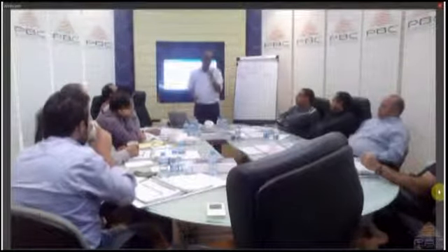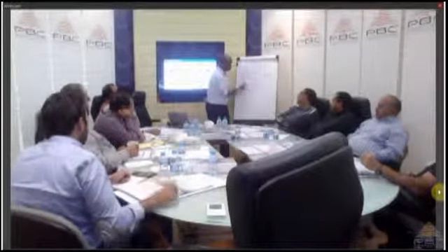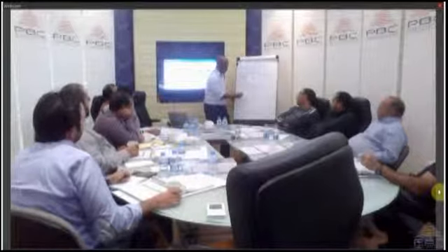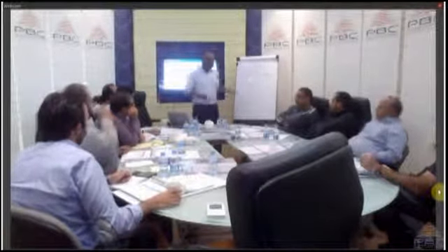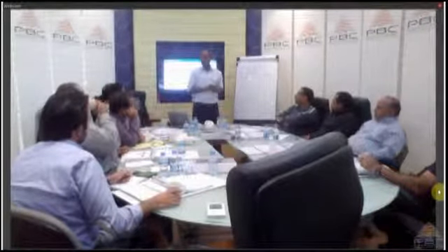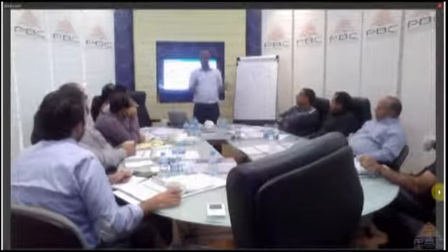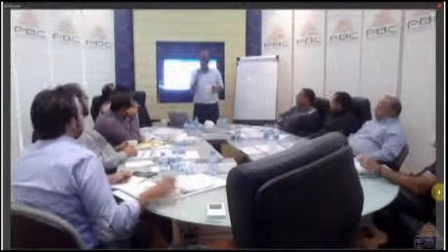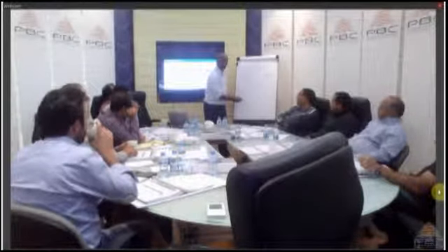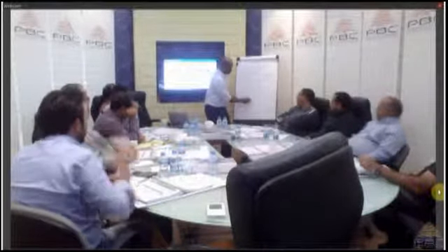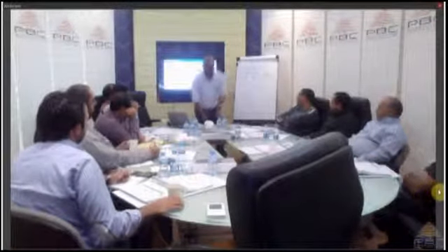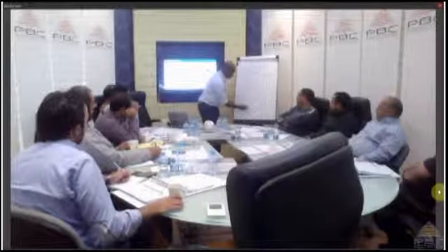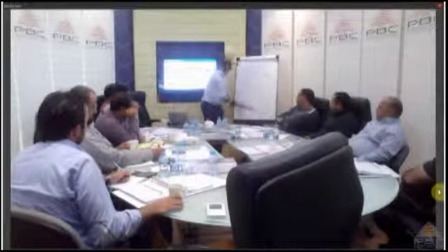Although it's their right, because in the tender document itself it says the client has the right to blah blah blah, if you do this with the intention of not having a project, this is unethical. You can do it as long as you push not an RFP or an RFQ, but an RFI, a request for information.